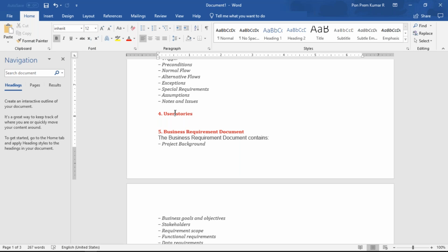99.9% of projects will require additional changes even after starting the work, so any new changes can be easily accommodated using agile methodology. Waterfall, like the name suggests, works only if the first condition is completed; then the team starts working on the second. Unless development gets completed, the testing team will not start their work. In agile, multiple teams can work simultaneously, in parallel, and it accepts changes.